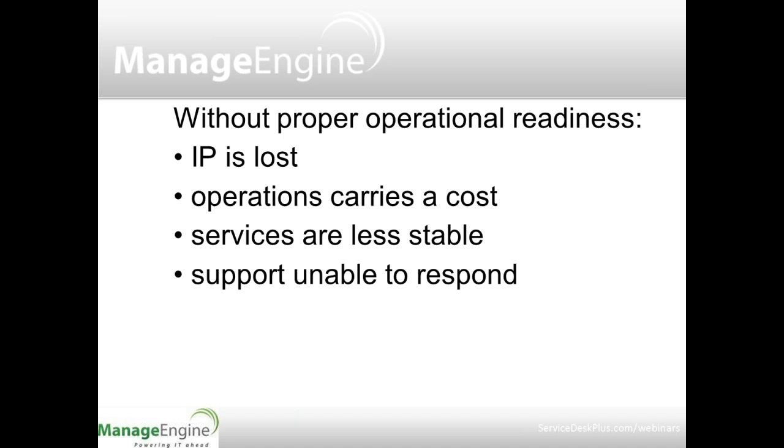And so the phones start ringing and the service desk don't know how to deal with the incidents coming out of that, and don't know how to provide the proper help and advice to the users, who are confused by this new system because they've been inadequately trained as well. So it's very important to make sure that the training component of this transition is in place, so that everybody knows what to do with the new system as it comes out.